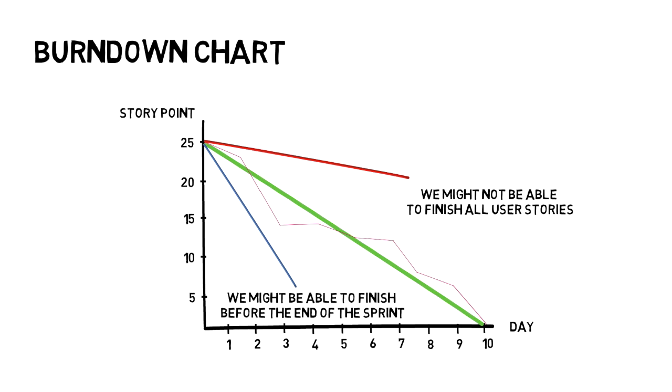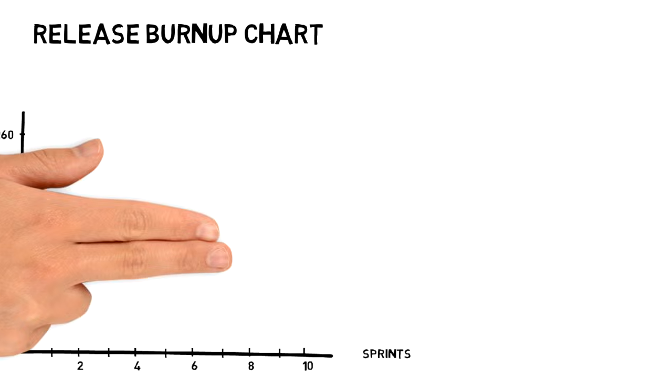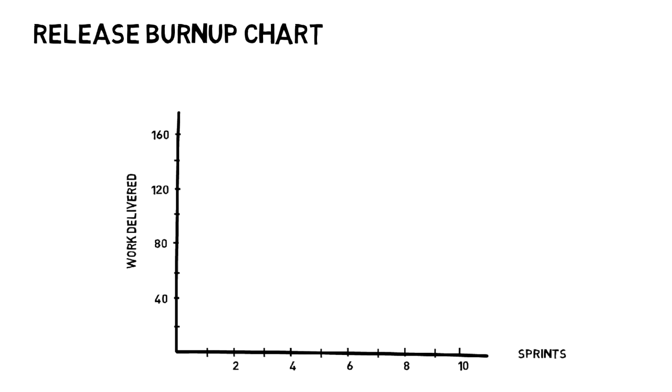Story points are also useful for product owners when discussing planning and costs with the stakeholders through the use of the burn-up charts. On one axis, we have the number of story points we have in the product backlog. The other axis represents the sprints. As said earlier, teams need 3 to 4 sprints to have a stable velocity and enough good data. The product owner can use this data on the predictability of the team.